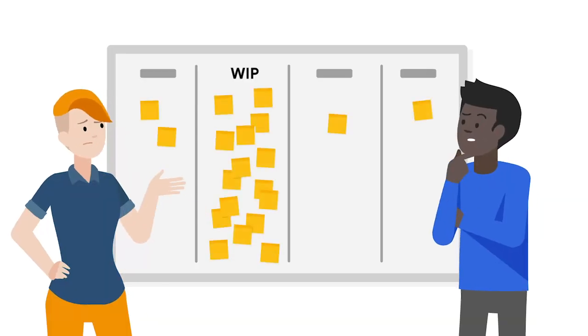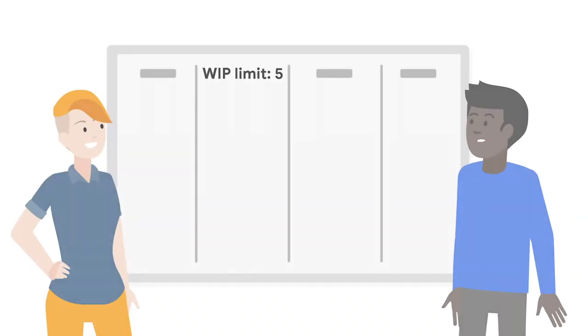When you use a Kanban or Scrum board, each team may set a WIP limit based on their configuration and context. This way, it's really obvious to notice when the team is going beyond the WIP limit.